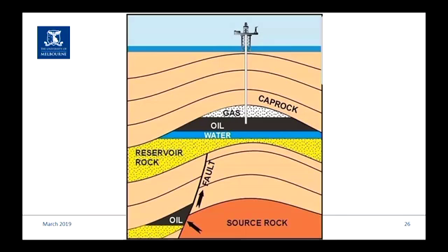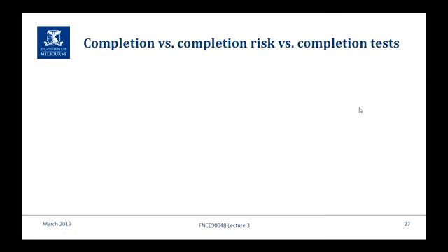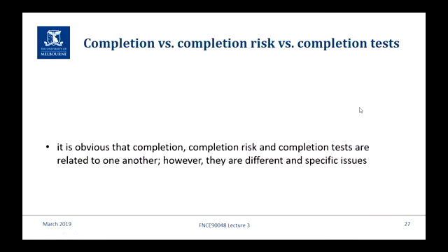And that implies how many barrels there are, because of how much you're going to extract. Then, once you've started operations, you can go down here and put in the equipment that reads the underground structure better, and you come back and say, yes, it is at least 10 years, or no, it's not. And if it's not, you're in trouble, because you don't meet the completion test. So there are all those different types of completion tests.